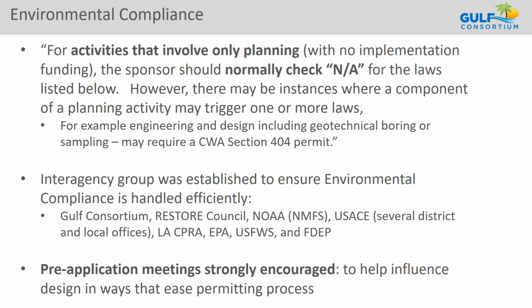And during that engineering and design, that environmental compliance will get resolved or will be demonstrated in some way through getting the necessary permits. But for projects that are actually turning dirt in some way, some type of construction project, you'll need a permit typically, and that permit usually provides sufficient demonstration that environmental compliance has been achieved.